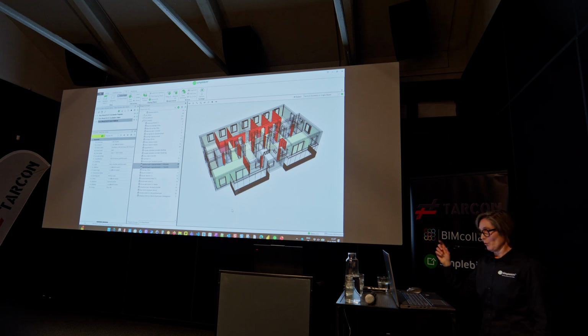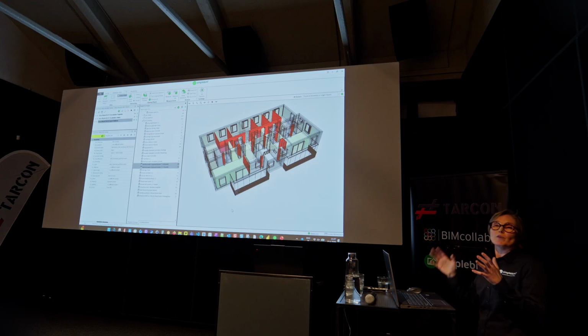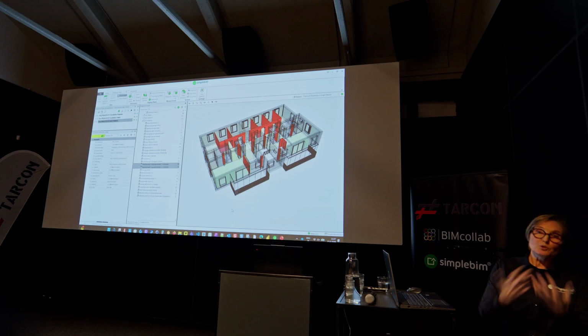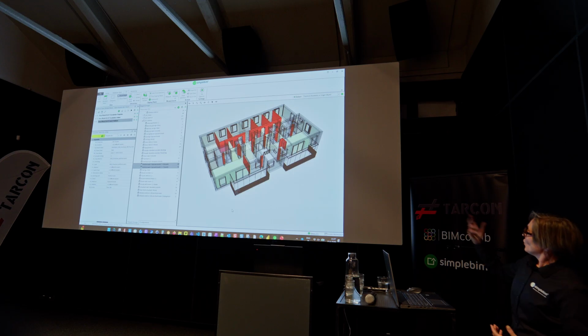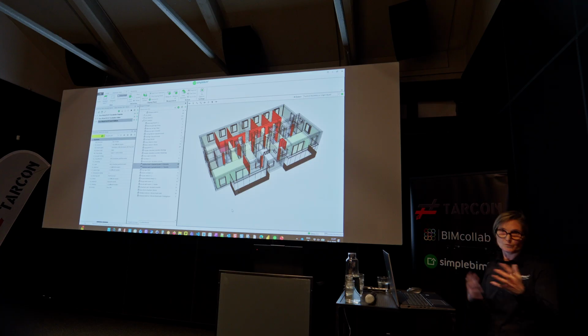Then the last information is a variable, a detail for specific use cases. For example, for material, logistics or installation calculation quantities, it's important to know if it's 2+2 gypsum boards. It's not just net area, something like that.